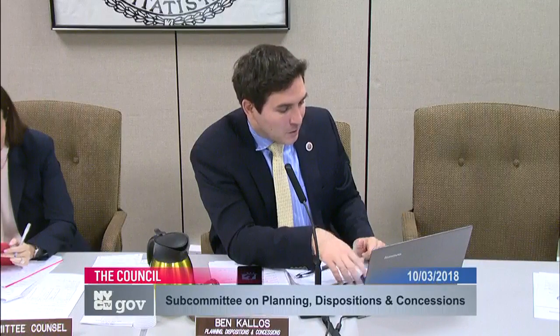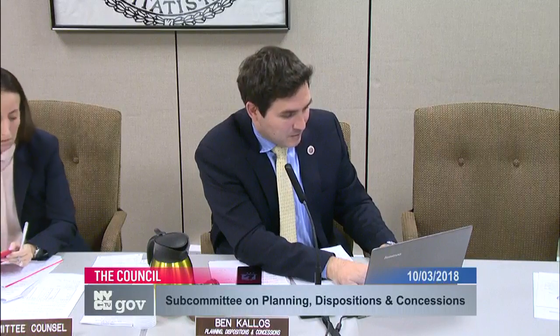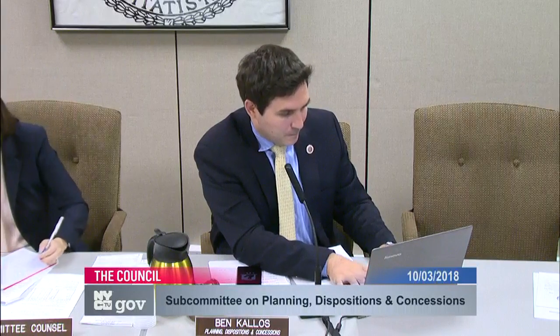You have the Article 11. What are the other sources of funding? We're putting in $100 million of our cash. The city is lending us $100 million, and we are borrowing $260 million. From a private window? It'll be a private construction lender, yes. Is the $100 million HPD or HDC or split between both? I believe it's HPD money. Any subsidies over and above the loan? No. No per unit subsidies. Do you know what term sheet you're using?